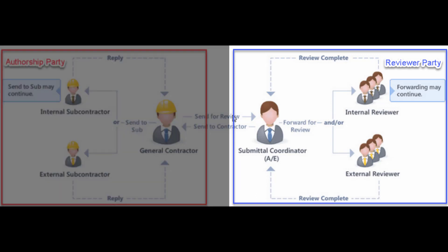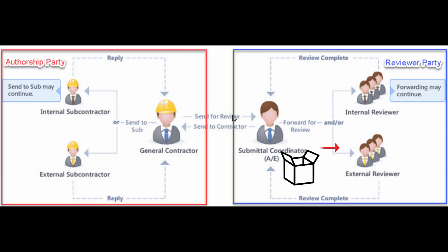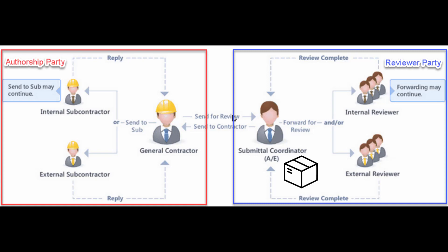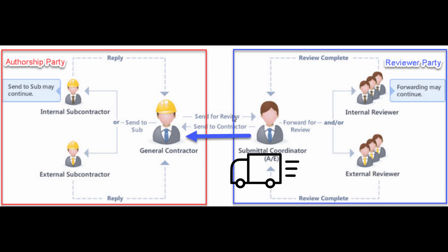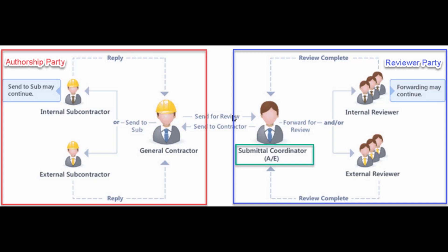On the other side of the aisle, the AE is the lead of the reviewers party. They will receive the package and, based on the submittal item disciplines, distribute it to different sub-consultants. After the submittal items are reviewed, AE will gather the review comments, consolidate the responses, stamp the documents and drawings, and send the package back to the constructor. In e-Builder terminology, this position is called the submittal coordinator role, which is very vital to keep the review process rolling.